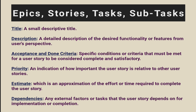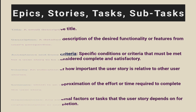Specific conditions or criteria that must be met for the user story to be considered complete and satisfactory. Priority: an indication of how important the user story is relative to other user stories. Estimate: an approximate effort or time required to complete the user story. Dependencies: any external factors or tasks that the user story depends on for implementation or completion.